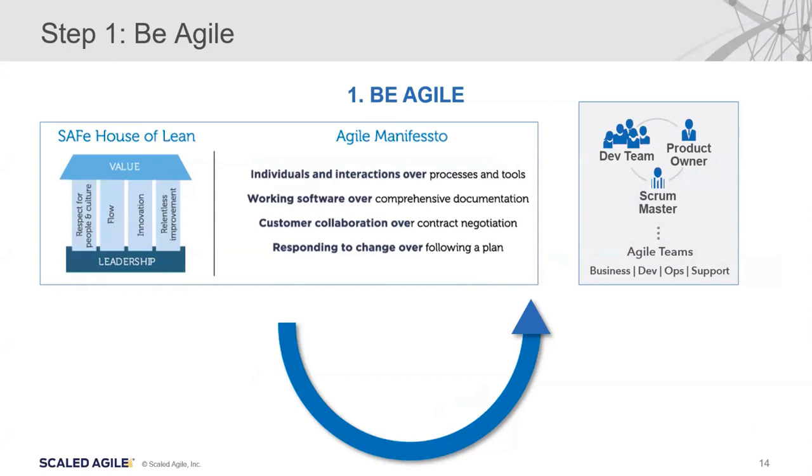In terms of the practices that Agile business teams typically adopt, we very commonly see them adopt the role of product owner, providing some content guidance around the work they're doing, and the Scrum Master role helping to facilitate the process. Again, it's very common to see them implementing the recurring events as described by Scrum: the daily stand-ups, the iteration planning, the iteration reviews, and the retrospectives. In addition, we see a lot of Agile business teams using visualization techniques such as creating Kanban boards to better manage the flow of their work. That's one topic we'll dig into a little bit deeper very shortly in the webinar.